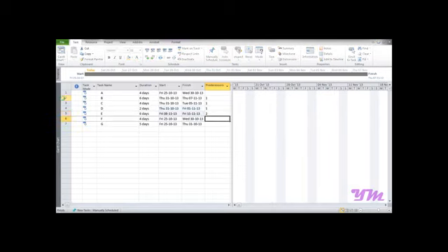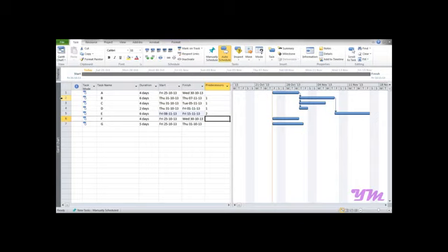Suppose activity C also succeeds activity A, then again you need 1 over here. Note that 1 is the number with respect to activity A. Suppose activity D is also preceded by activity A, then you again write 1 over here. Now activity E precedes activity B, so yes, you are correct, you need to write 2 over here. Now you might have a question: can activity F be preceded by only one task or more than one task?